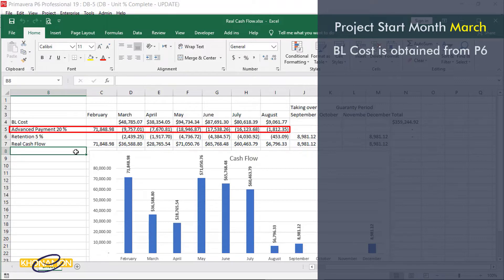Generally, Advanced Payment is paid by the contractor a month before starting the project. So we have another column — the February column.